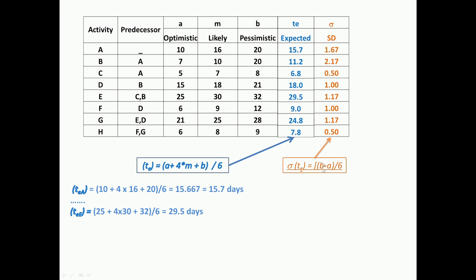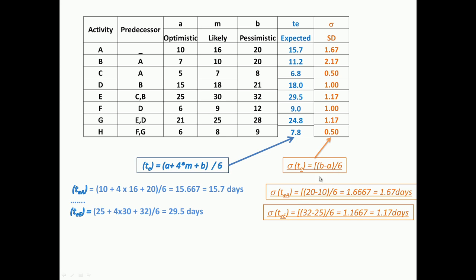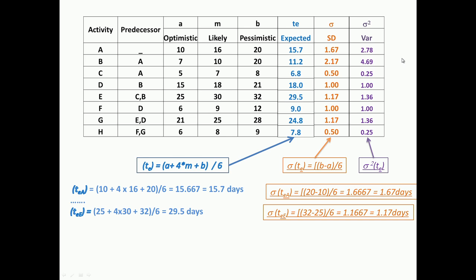We then move on to calculating the standard deviation for the activities. Applying this formula, for activity A we have B minus A, which is 20 minus 10, divided by 6. This gives the rounded-off value of the standard deviation of the activities. From the standard deviation, we square it to get the variance values for each activity. So we have taken the basic input data, converted it to expected duration, standard deviation, and finally the variance of the activities.